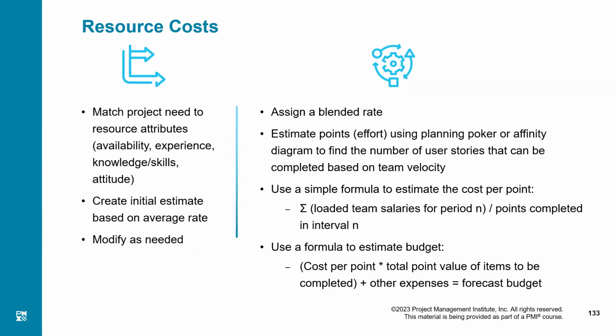So what is the story point for the top listed item on the backlog? Say it comes out to be 200 story points. We say, okay, out of the 700, we can do it. Pick up this work and we take it along. Then we say, what next? Next one is 100. I say, okay, pick that work also. Now we are left with 400 story points. Then we say, what next? Then it is a story that is only 10 story points.